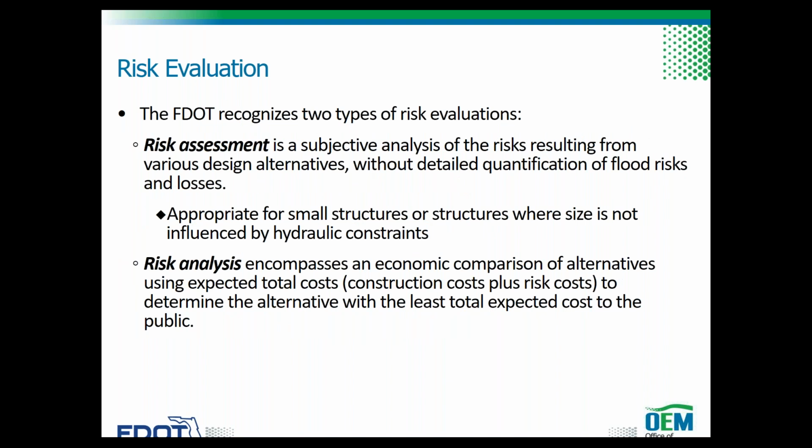To quantify the risk on project alternatives that encroach on floodplains, FDOT uses risk assessment or risk analysis, depending on the significance of the floodplain encroachment. Risk assessment is performed for minimal encroachments, while risk analysis is performed for significant encroachments that are anticipated to increase or substantially change floodplain elevations or limits.